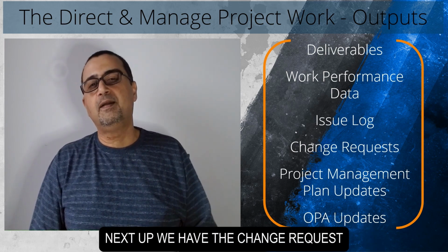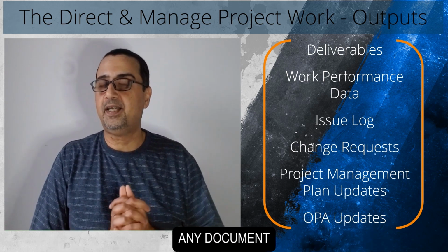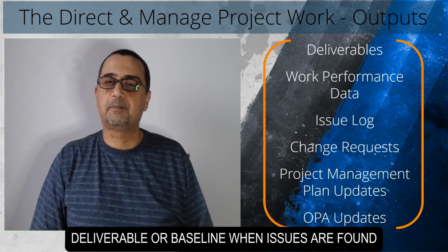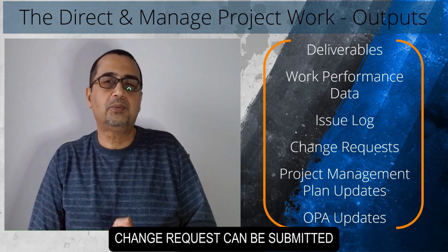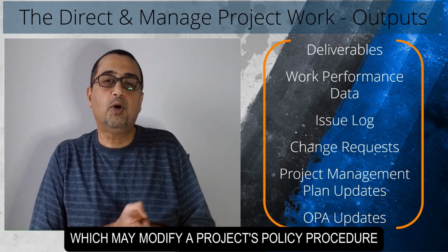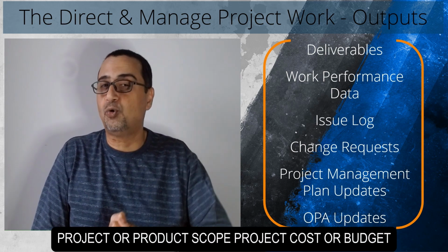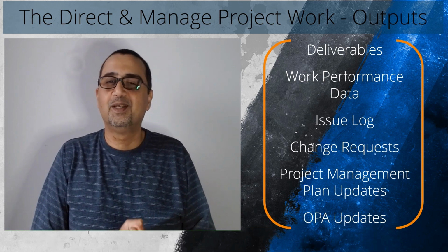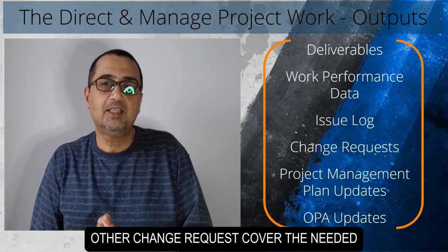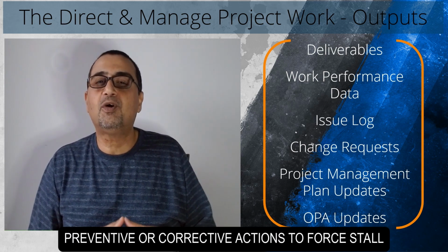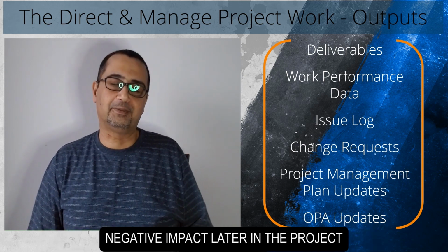Next up, we have the change request. A change request is a formal proposal to modify any document, deliverable, or baseline. When issues are found while project work is being performed, change requests can be submitted, which may modify a project's policy, procedure, project or product scope, project cost or budget, project schedule or quality of the project or product results. Other change requests cover the needed preventive or corrective actions to forestall negative impact later in the project.